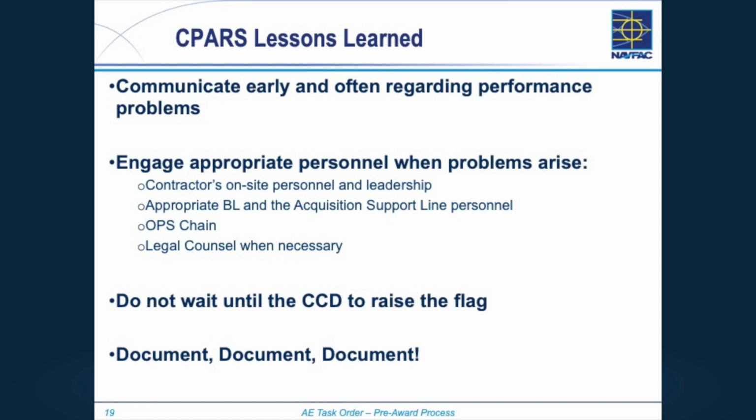This is where I was telling you, in your P drive folder, if you've got some sort of note, like you were 2 weeks late on this schedule submittal, and I need to keep this project on schedule because it's a mission tie-in, and you've sent them that warning, you probably want to keep that in your file. When the next one comes in, if they've made it up, you can send back a thanks for making up your schedule, and you can document asked and answered. Or, gee, now we're a month behind. We used to be 2 weeks behind, now we're a month behind. How are you going to make up this time? Because I really have to have this on the date I said. And generally, it's a positive experience with our AEs.